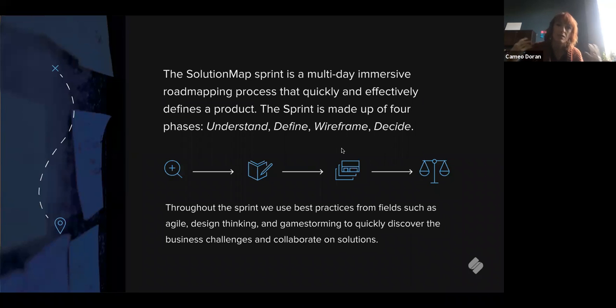And so we started taking those ideas that were coming out of Google Ventures, and we started playing around with how we could use a sprint style immersive workshop to really, over the course of a week, understand those requirements, force the client to make decisions about what matters and what they actually need in the MVP, uncover the big questions, uncover the risks, and then use the wireframes to lock down the decisions in a low fidelity UI so that later they ideally can't say, well, you guys promised us X, Y, Z. And hopefully we have healthier conversations with our clients than that anyway. But